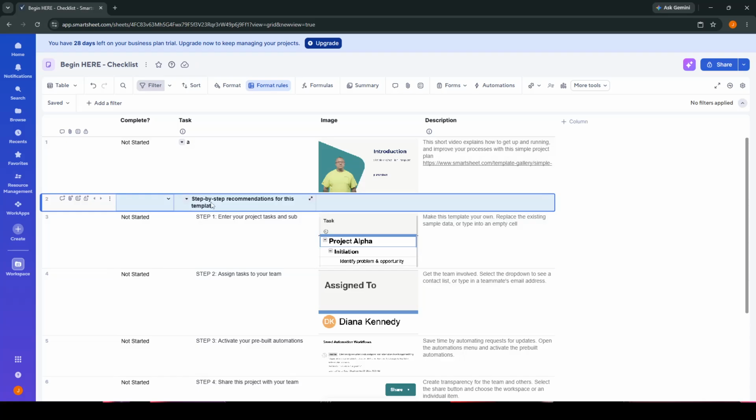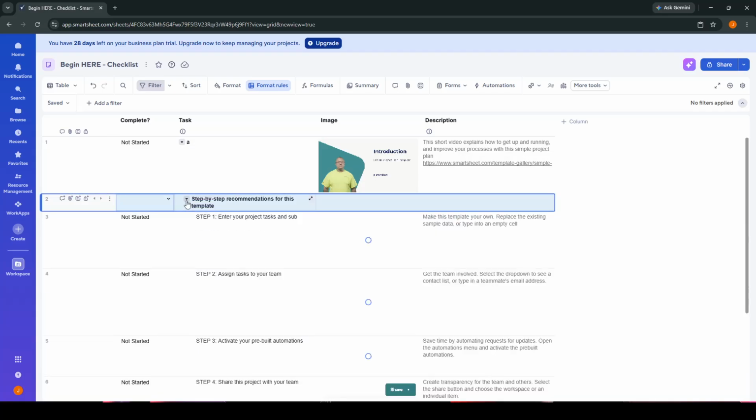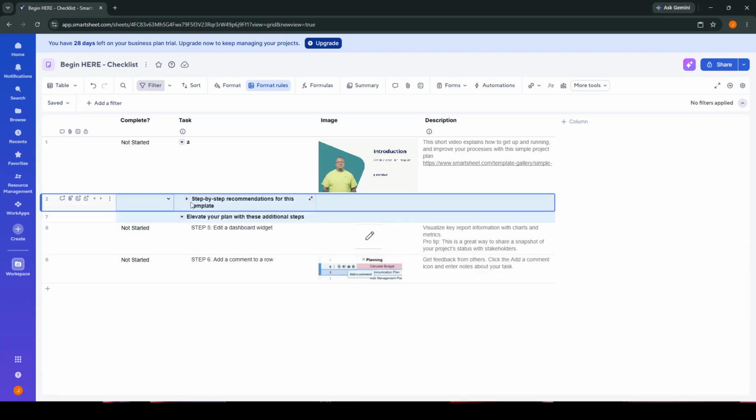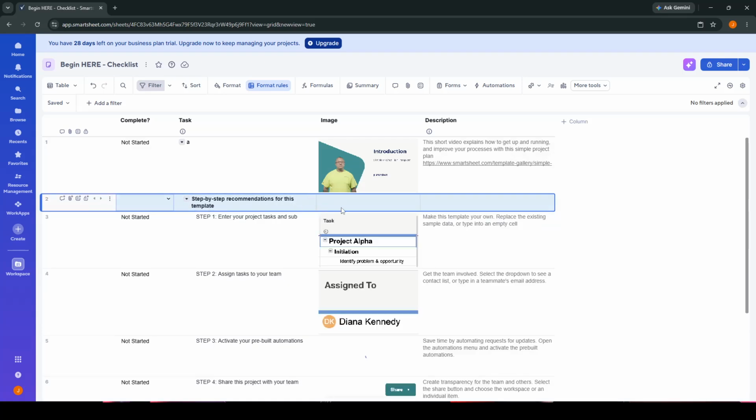Take a moment to confirm the result on screen. You should see the selected rows indented relative to the rows above them. If your sheet includes multiple levels of related information, you can apply indentation again to create deeper levels of grouping, as long as the correct rows are selected each time. If at any point the indent is not quite right, you can adjust by selecting the rows again and using the corresponding outdent option, returning them to their previous alignment.